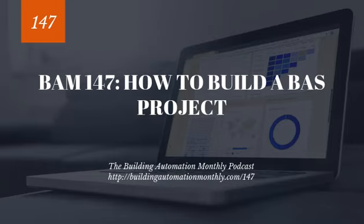So with that being said, you create your control submittal, you submit your critical RFIs. So you go and make sure that any requests for information that are critical to the success of the project have been submitted. Then we move on to step number 4. We line out our team. This is where we have an internal meeting with our techs, designers, programmers, and subs. We make sure we answer any questions. We ensure we have spec alignment. We make sure we have dates.